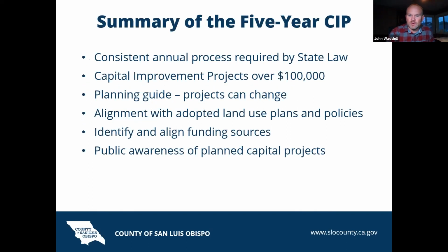So, what is the 5-year capital improvement plan? It sets out the county's intended construction program for significant facilities and infrastructure projects over the upcoming 5-year timeframe. This is required by state law: county agencies have this plan, updated annually and approved by the Board of Supervisors. The capital projects covered are those over $100,000.